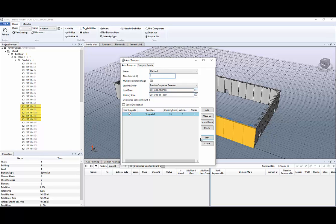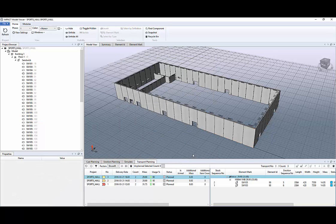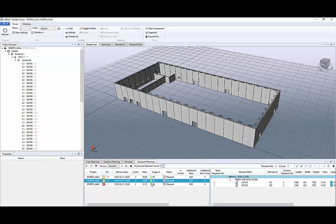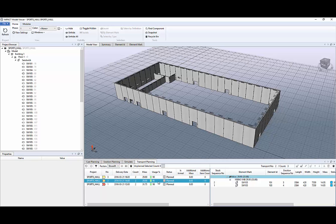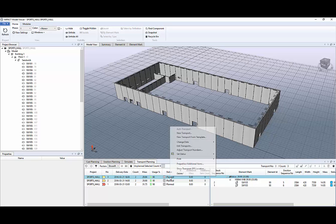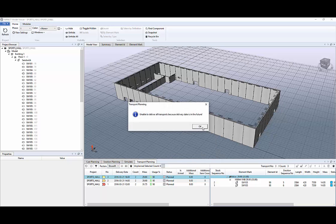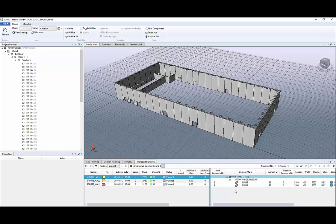And auto transportation planning is done. You can see that we have two elements on each transportation planning. And we can set some status like planned or delivered. But we can't do that because it's a future plan.